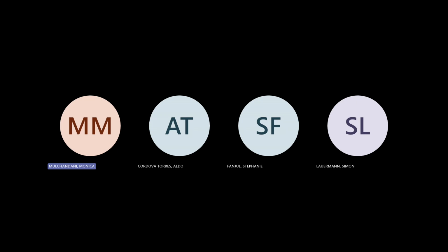So normal CIP, just as a touch point, goes through pre-scope, which most projects go through, then scope, then design, then RFC, bid and award, construction, and closeout. Now, this is what activities are done on a project. Now, who does the activities? That's separated out also.